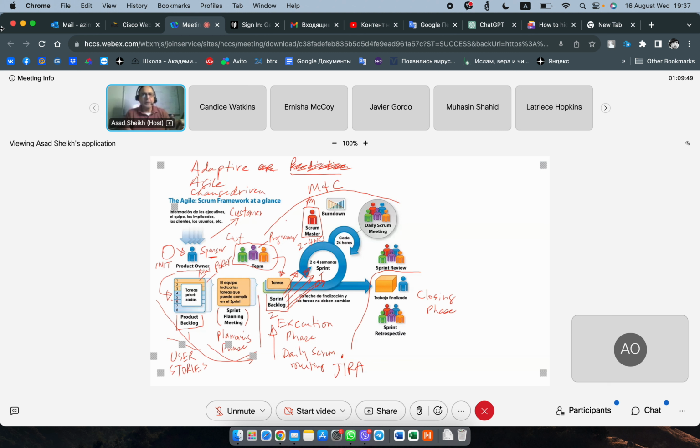I know you will get it done by Friday, but what if something happens and you cannot? At least on Thursday, I'll know, and I can warn whoever needs that deliverable, right? I can warn the people something happened, or I can escalate, or I can do something. But if on Friday I want the deliverable, and they say, because something happened on Wednesday or Thursday, we are not able to deliver on Friday.